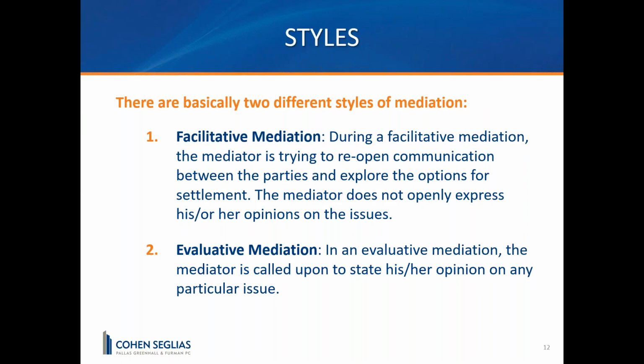In terms of styles of mediation, there's really two different types. There's the facilitative mediation, and during that process, the mediator that you've selected is trying to reopen communication between the parties and explore what kind of options there might be for settlement, but the mediator is not going to openly express his or her own opinions on the issues, whereas in the evaluative mediation, the mediator is going to be asked to state his or her opinion on a particular issue.